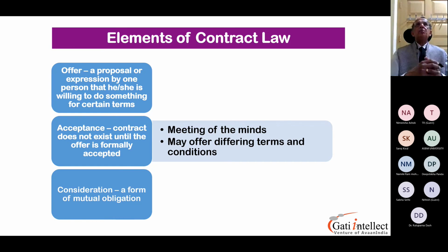Okay. Then once you get the performa invoice, what are you doing? What is the next step you are getting into? Yes, Nimisham. Please don't forget these processes. Then you're getting into the purchase order. Now, are you able to recollect? Okay, now you are able to raise a purchase order based on the performa invoice which has been provided by the seller.